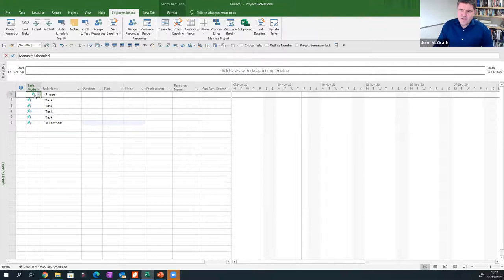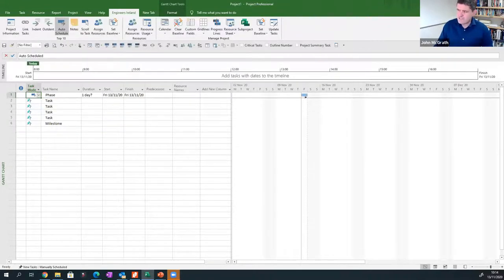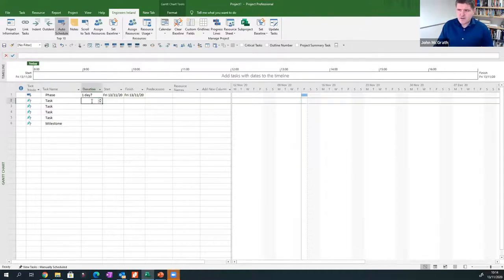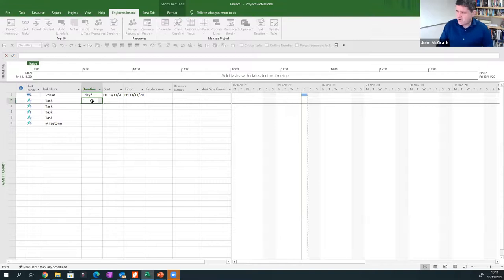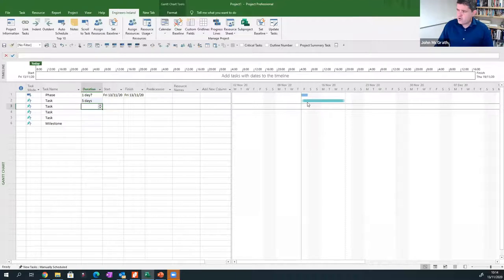If I go in here and change it to auto-scheduled, the software sort of wakes up and you can suddenly see a bar has appeared on the Gantt chart. By default it is one day. The blue bar is good practice; the shaded green one underneath is bad practice — that is manually scheduled. So I want to enter a few more values and we'll see this working.